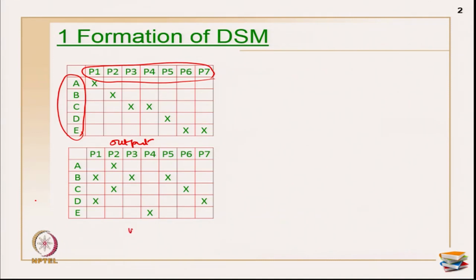Okay. And this table is primarily on input items, which implies, let us assume these are my teams and/or deliverables and these are my parameters, then this is a DMM on teams and output parameters, and this is on teams and my input parameters. Okay. So, now how do you read this? Primarily team A gives one parameter P1, team B is responsible for releasing one parameter P2, team C for releasing two parameters P3 and P4, like that you may have to read.